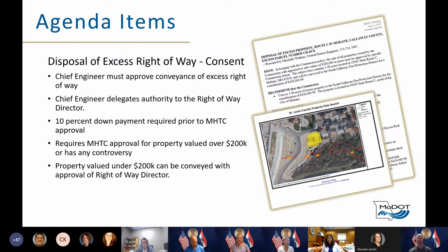If approved, appraisal, marketing, and negotiation are completed by the district. Appraisals are based on the assumption of fee simple title. Prior to requesting commission approval, a 10% down payment is required. Commission approval is required for property valued over $200,000 or with any controversy.